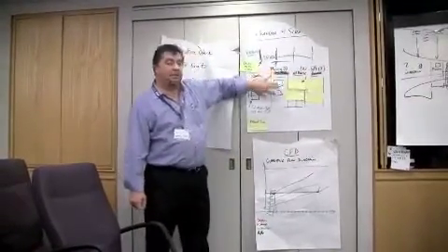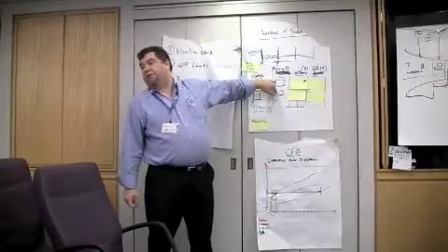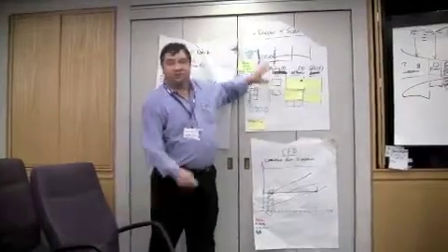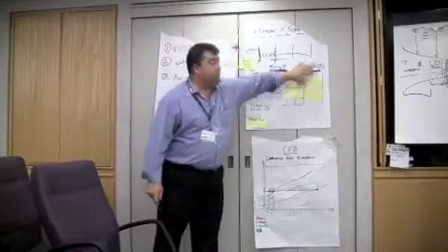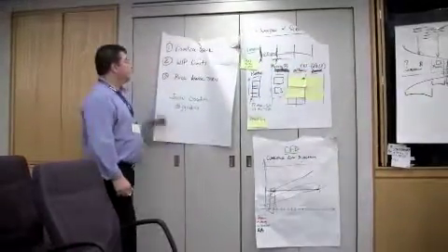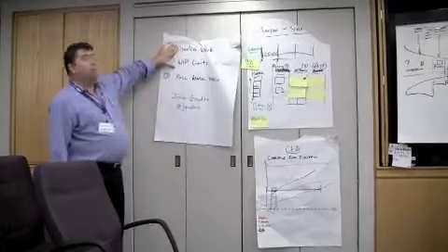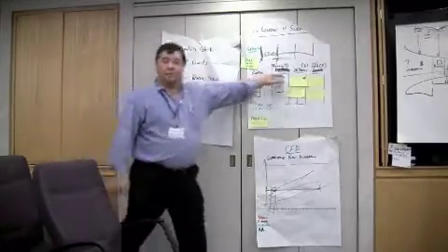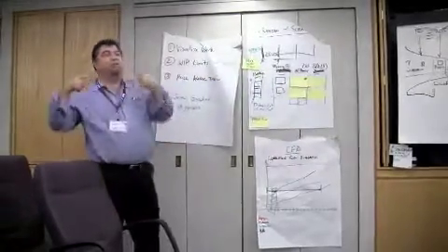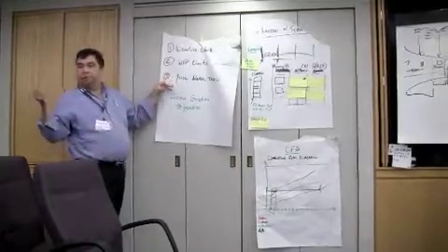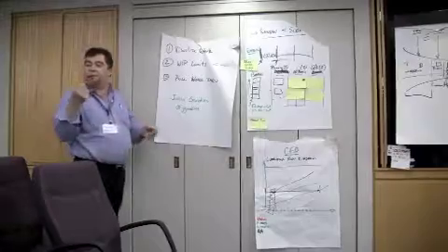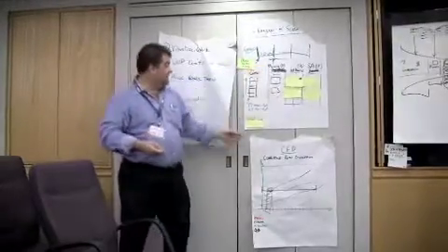Here you see a 2, which means I only allow myself to have 2 cards in this lane, or 2 units of work if you're using points. Here I only have 2, here I only have 3. That's the second step. Then, once I have work and process limits in, and there's a whole strategy on how to find your work and process limits, then we pull the work through. You don't push the work downstream, you pull it through, observing these work and process limits.